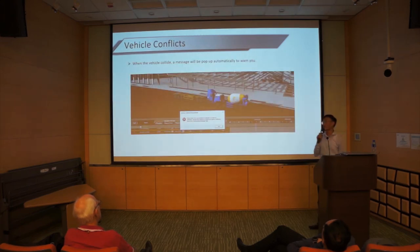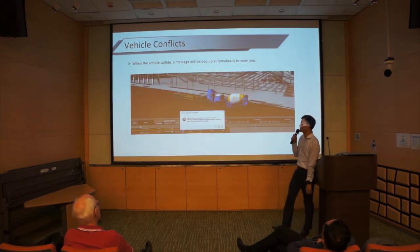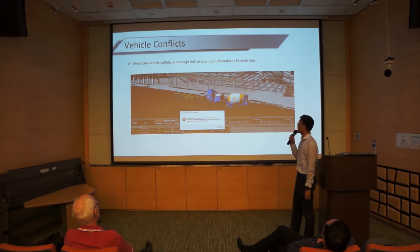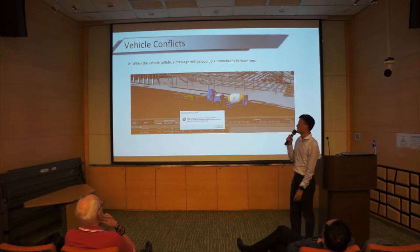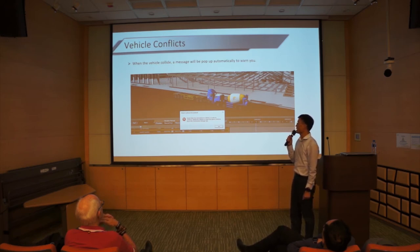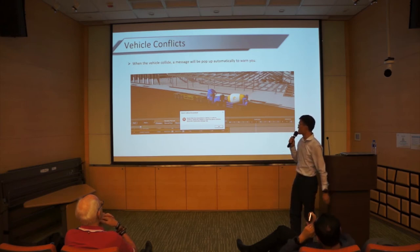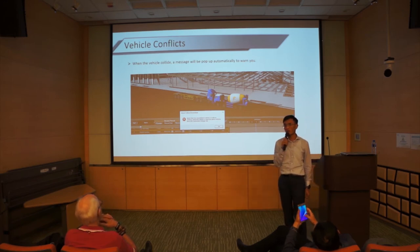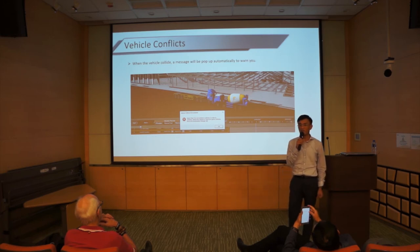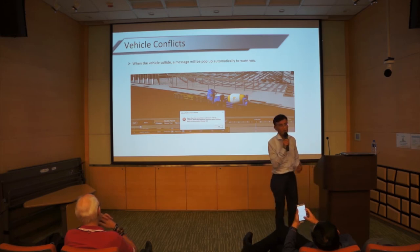We talked about vehicle conflicts — I prefer to call it fully collidable scenarios. Our Japanese clients like to have this simulated because when you plan it, you don't see the collision right away, but when the animation plays, that's when the collision happens. The real danger I see is tower cranes and luffing cranes — they have a very high probability of colliding with each other, so we need to prevent that.